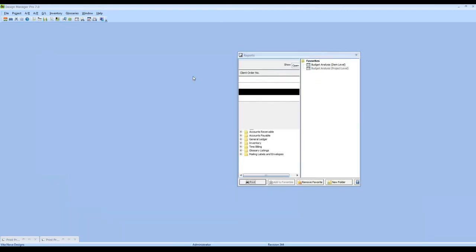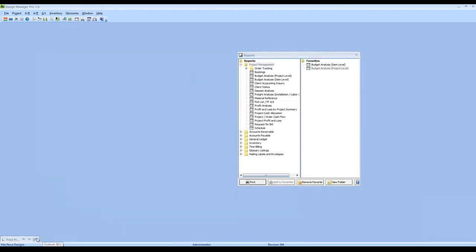And actually, there is one point before we move into item level budgeting that I wanted to show. Budgeting at the project level for locations is very project specific. But if you tend to begin to establish your budgeting system at the sales category level, you very well might frequently have the same set of budgets each time, perhaps for accessories, wall treatments, furniture, etc. If that's the case, you can even configure Design Manager to automatically create entries upon creating a new project.